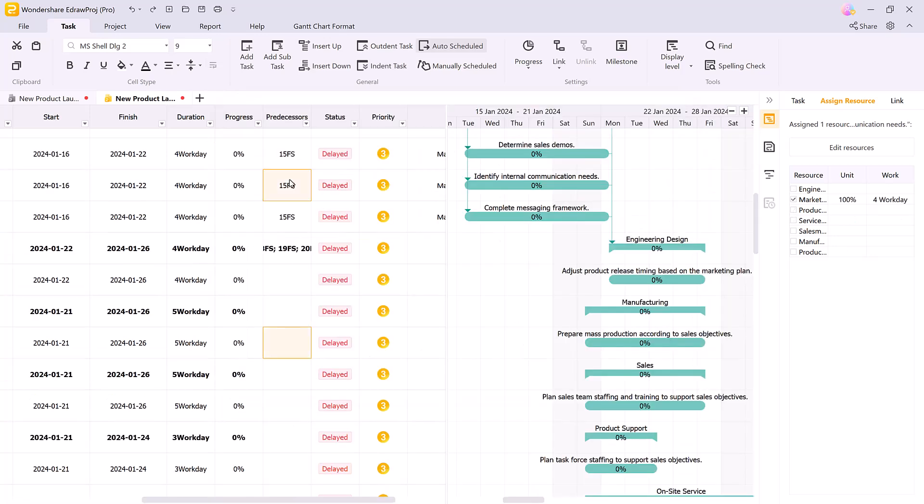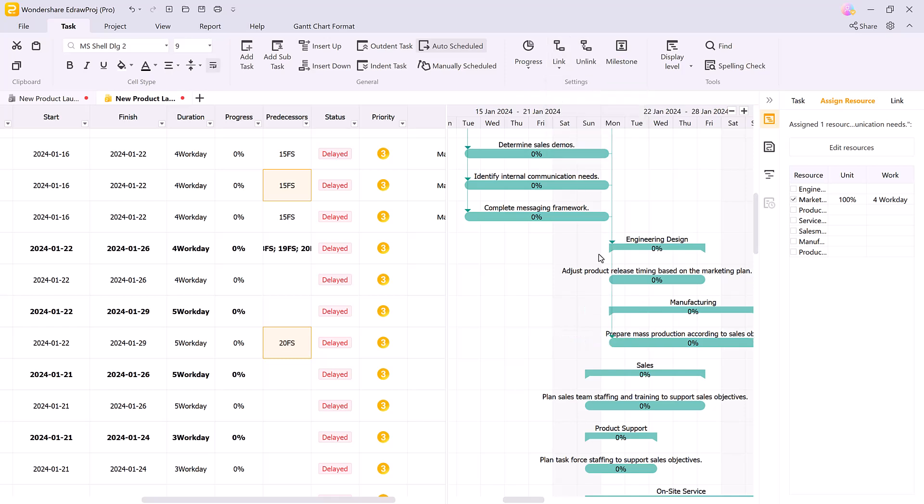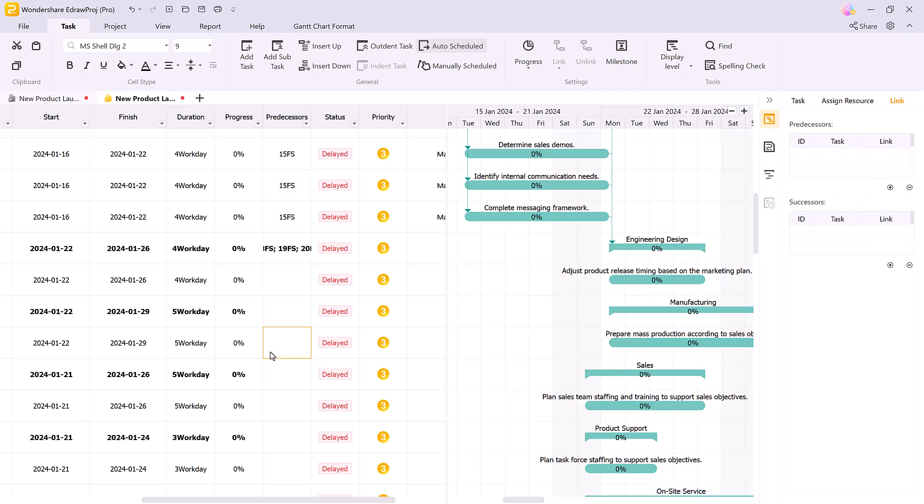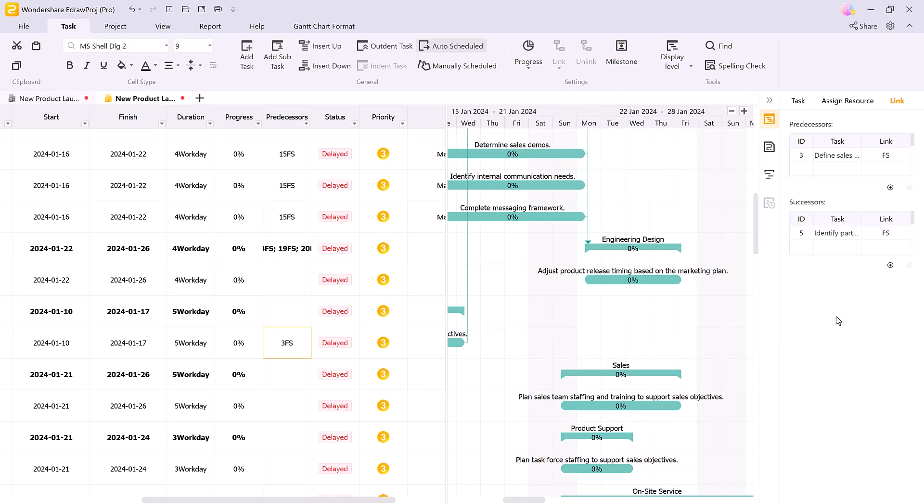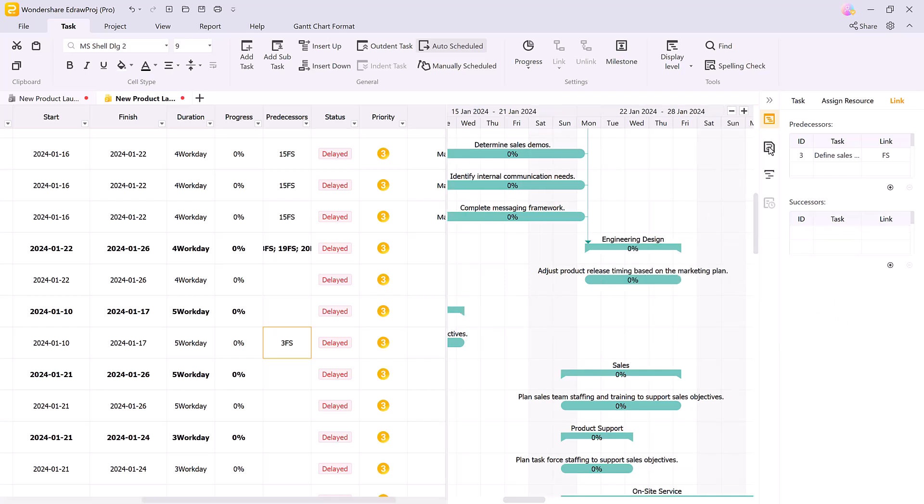To link tasks, just select two tasks and link or unlink them as needed. In the link section, you can manage task dependencies by adding, removing, or modifying predecessors and successors, ensuring smooth project flow from one phase to the next.